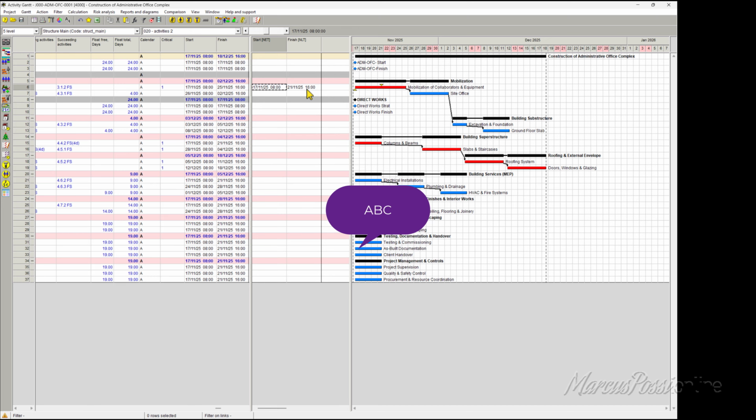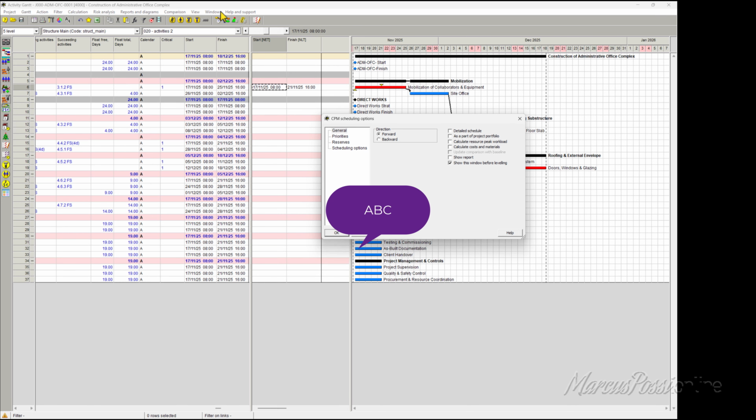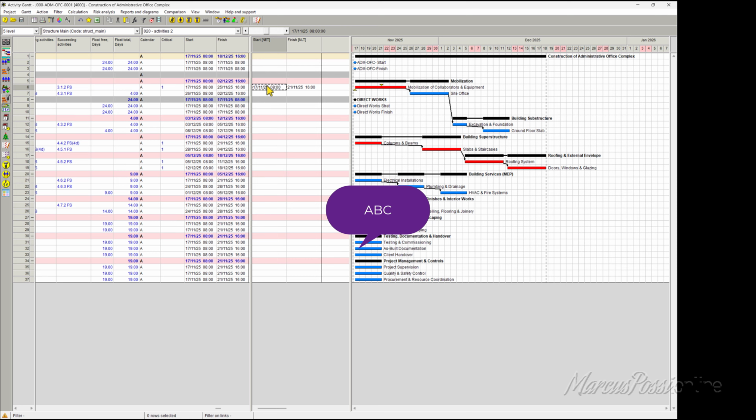Okay, and let's schedule again. If I say do not start earlier than 20, the triangle moves for the future. Okay, reschedule. Spider obeyed this command, do not start earlier.